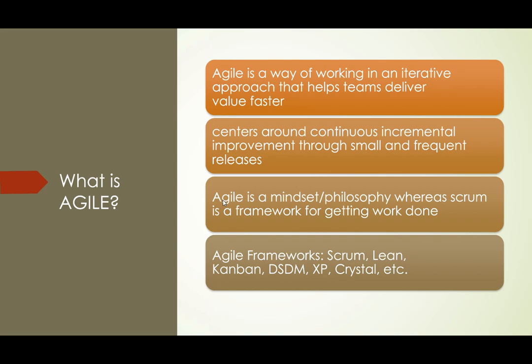So this waterfall model would generally be useful when the entire scope of the project is known in advance, whereas the agile methodology is useful for complex projects where the requirements change frequently, like if there are any technology changes or other functionality changes happening frequently. In such complex projects, the agile methodology is preferred.